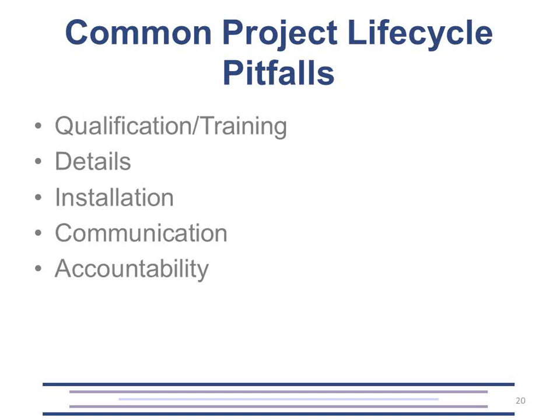Communication is always a challenge, not just between designers and analysts, but also between installers and designers. If the gap exists, at the very basic level, it means that a change happened in the field or in the design that wasn't communicated to an analyst. And then finally, accountability is, as we see, more built into the existing building process, and that step is often missing from a new construction process, unless the designers have been contracted up front for M&V follow-on work.